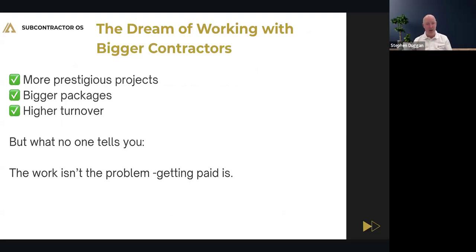It's actually staggering. I oversee hundreds of payments to subcontractors every month in the current business that I work for, which is a substantial business. Subcontractors submit their valuations late. It blows my mind. All main contractors have a very strict payment cycle that they work towards. The first thing is they don't get their valuations in on time. The second is they're not documented in the right way. They're not substantiated. They're putting on unsigned dayworks, variations without the right backup. And there's little nuances commercially. If you don't follow them, it's just giving the main contractor a free card to deduct your payment or refuse to certify, and it's putting you further and further on the back foot.